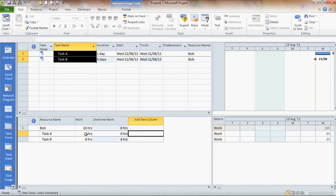So he's doing 8 hours of normal work at the normal rate of pay on task A. He's then going to do another 8 hours of overtime work at overtime rate on task B.